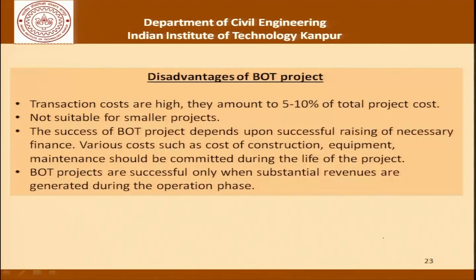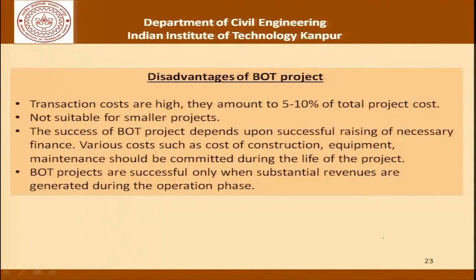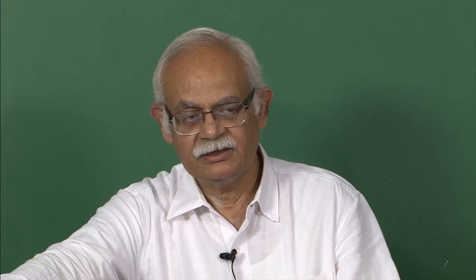However, there are disadvantages: transaction costs are high, amounting to about 5 to 10 percent of total cost; BOT is not suitable for small projects; the success of BOT projects depends on successfully raising the necessary finance; various costs such as construction, equipment, and maintenance must be committed during the life of the project; and BOT projects are successful only when substantial revenues are generated through the operation phase.